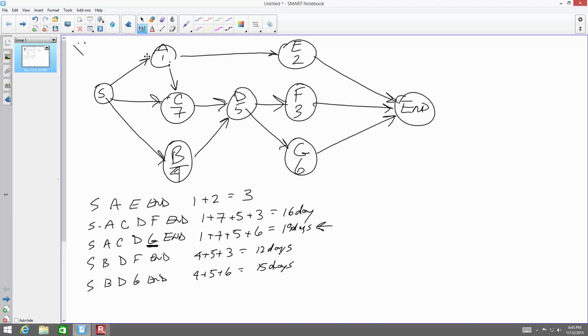Is it qualified? That's not qualified. It's responsible bidder. Normally the phraseology most people will say is that they will award the bid to the lowest responsible bidder.